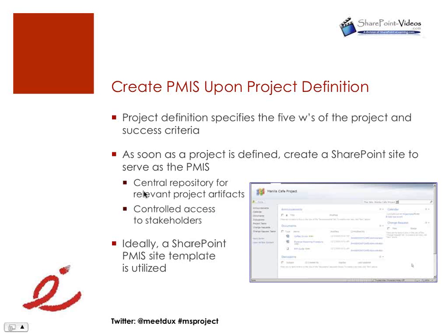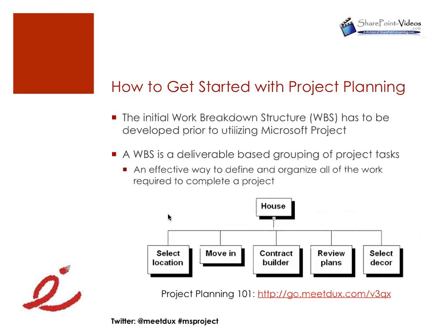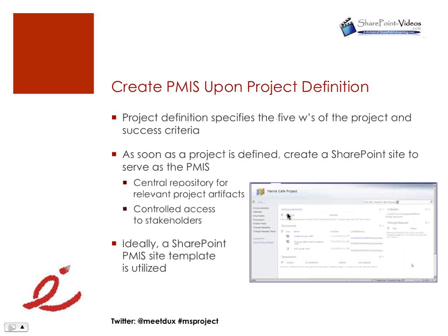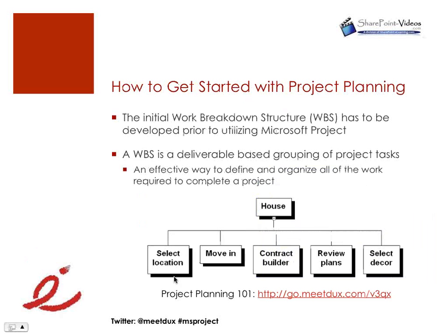Let me just go through a couple of things, so it'll refresh and we'll be good to go. Part of our process is that when a project gets initiated or defined, we create a PMIS. Ideally, this PMIS is nothing but a SharePoint site, but more importantly, it's already predefined with all the necessary components, which in SharePoint are known as lists or libraries. The idea is to make the lives of your project managers and project team as easy as possible, so you pre-populate templates, dates, and anything relevant for this specific project. We'll get to see that once we flip the screen up.